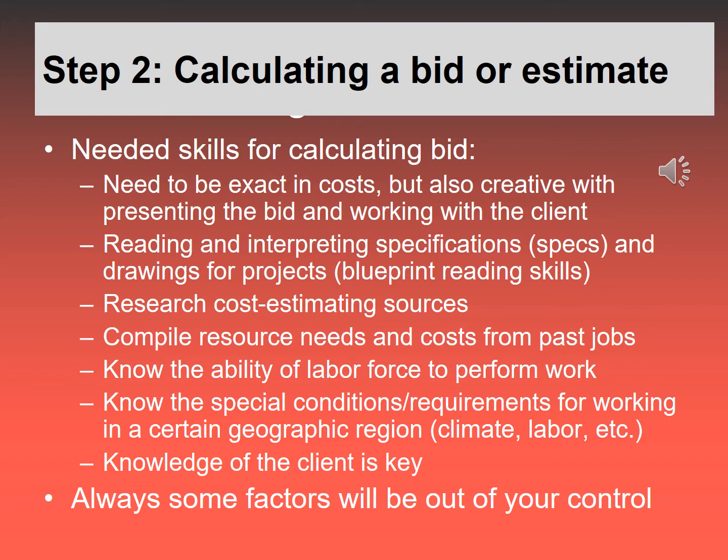And as you progress in your profession, one of the most important things that will help you accurately estimate jobs are your past jobs. So as you take on a job, you keep really detailed records of each part of a job, how long it took, how much labor was involved, how many people you needed, things like that. So you know when you get to the next job, let's say the first job you do is building a privacy fence for somebody between their neighbor and them.